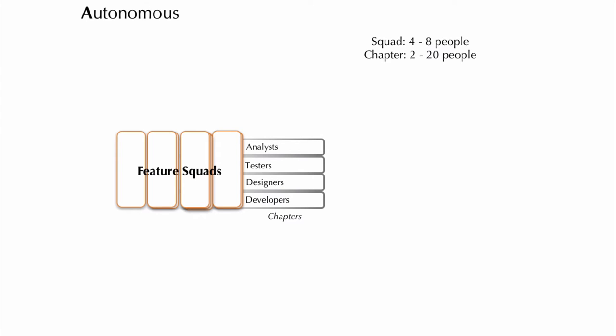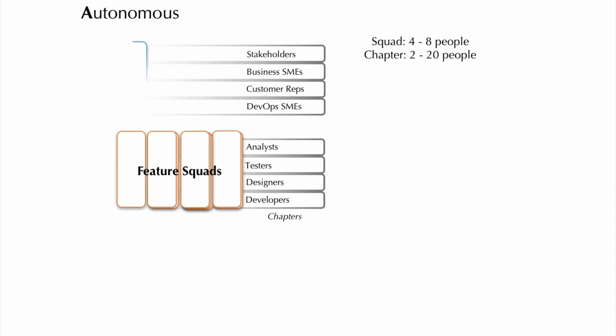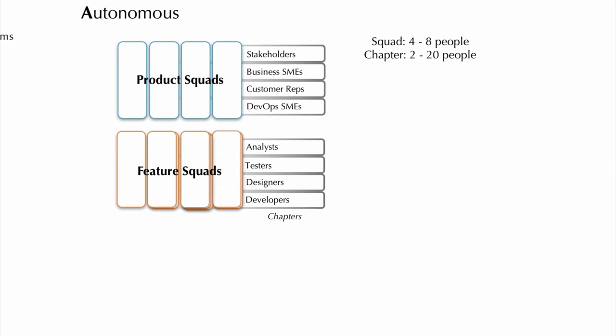So in XSCALE, we recommend the chapter meetings popularized by Spotify's Henrik Kniberg. Once a week, at a time immediately preceding squad retros, all people of a common competency meet. All the devs meet with each other, and at a separate table all the testers meet, and separately all the analysts, and so on. The chapter meetings all occur simultaneously, so the squads are never starved of any particular competency. The subsequent squad retros align each squad's local improvements to the context of all the squads in the portfolio. The product squads are likewise aligned by chapters.